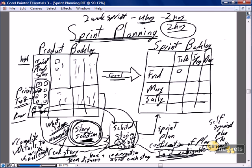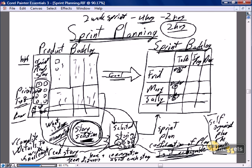We take each story and plan it. Story number one is assigned to Fred for design, who passes it to Mary for development, who passes it to Sally for testing. In the second two hours of our sprint plan — the confirmation of the plan — each of the nine selected stories ends up in our sprint backlog. Whether you break it down by resources or by to-do, in-progress, and done, each story is assigned to resources, and the key is identifying who the resources are per story.